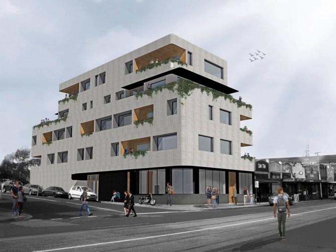So it's a very, very tough ask, because you are relying on other structure as well to stay on critical path, so that you can pull this material on site when it needs to come. But as we know, it never really goes to plan, so that needs to be planned for. So the advantage of once the CLT is going up, it'll go up floor by floor, roughly weekly or whatever, fairly quickly. And then, of course, there's no props or anything, so all the other subcontractors can come in.